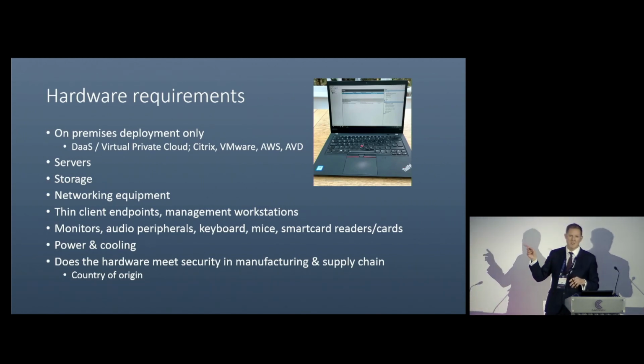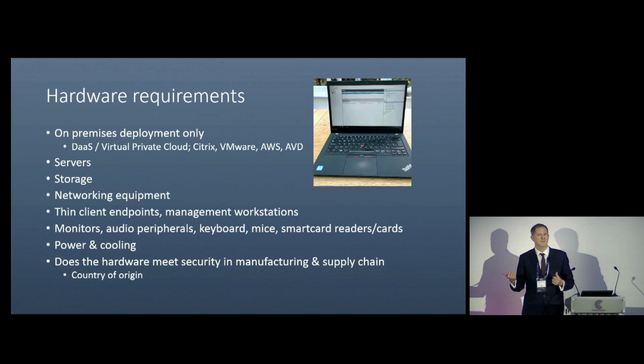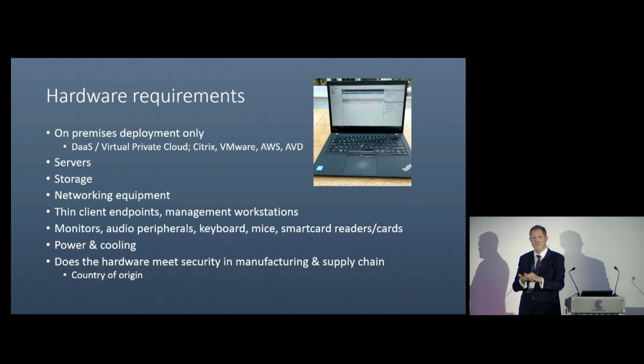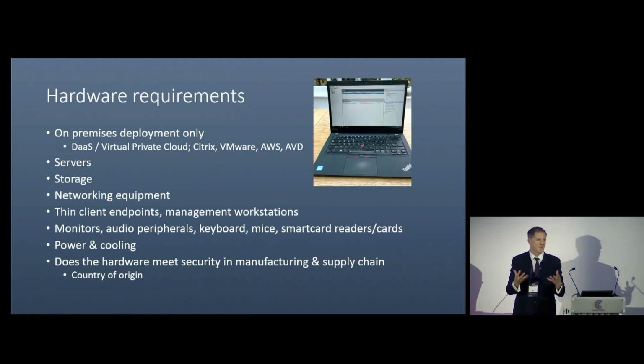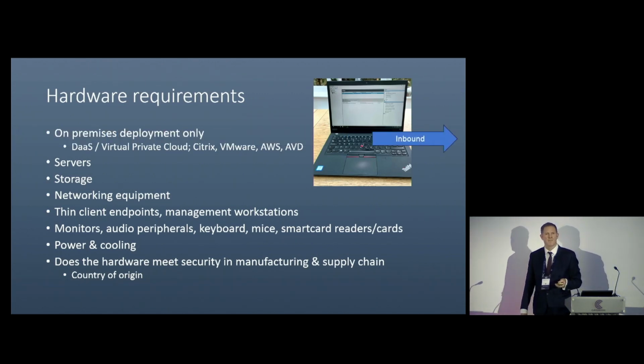This is a picture of a laptop I had to take to a customer because we were doing a proof of concept. Their security wouldn't allow us to build a virtual machine in their environment to manage thin clients. So I had to budget for a laptop, put a hypervisor on it and certain components, walk it into the customer, and then I knew that that device is never coming back.